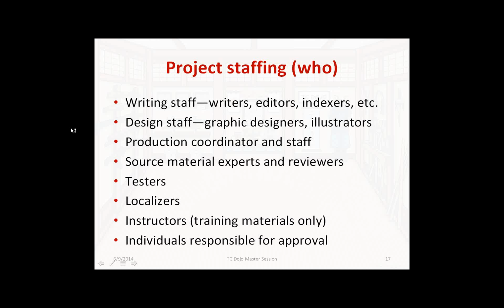Individuals responsible for approval. You may have 15 reviewers for each section identified, but when it comes to individuals responsible for approval, you want one, count them, one, only one. Everybody write that down: one person responsible for approving each section, formats and standards, technical content, and so forth.